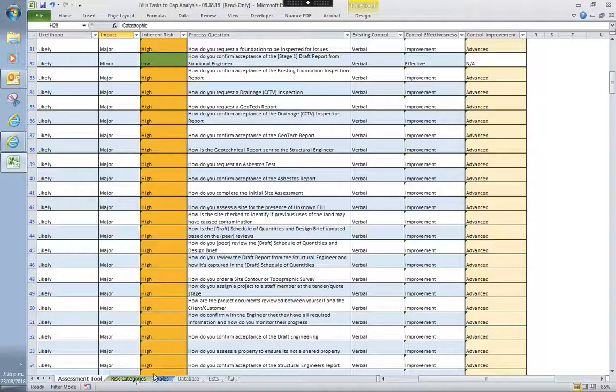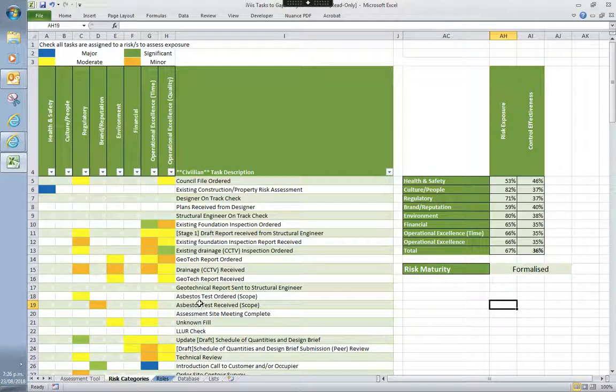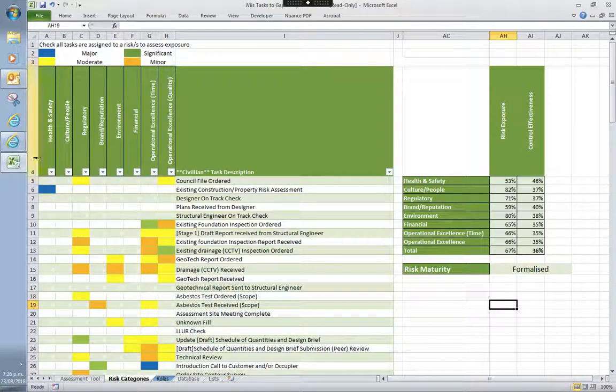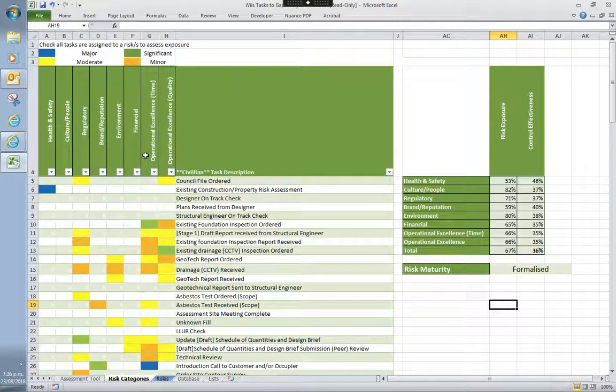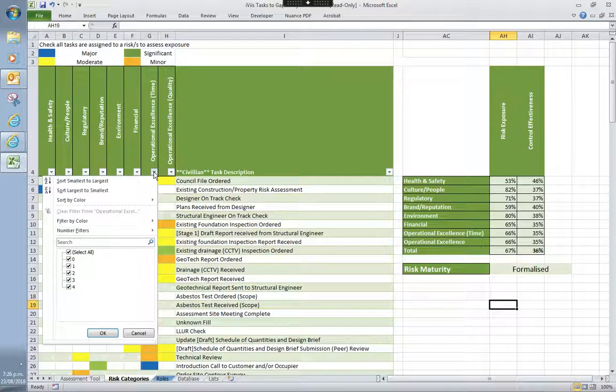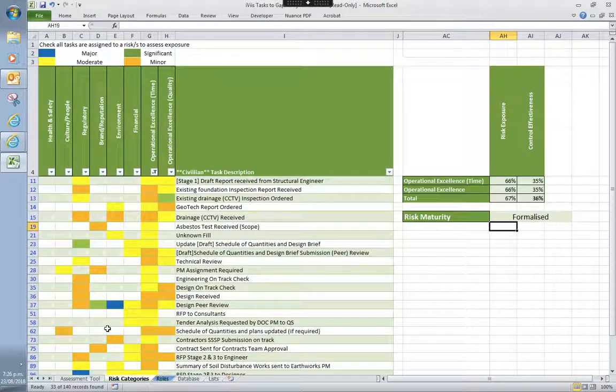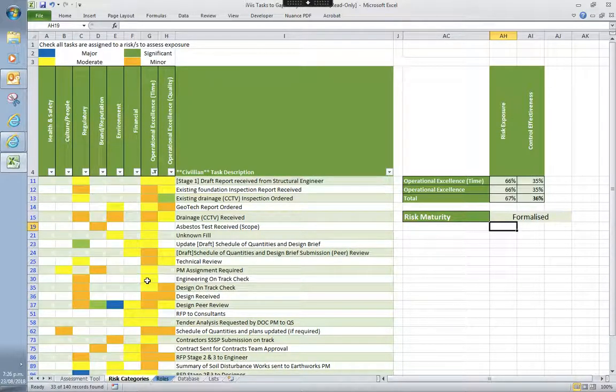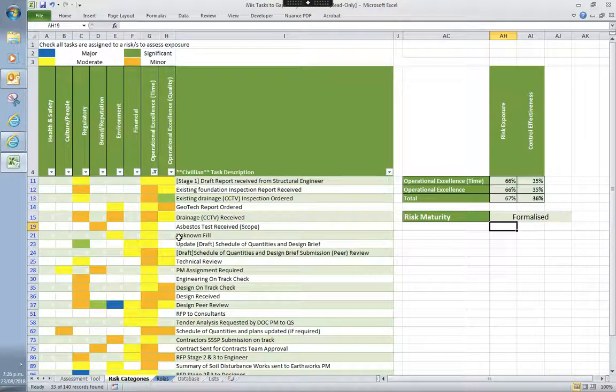All right. Next up, because everything is connected, we have the risk categories. So what we've looked at is the eight major categories, which is health and safety, culture and people, regulatory, brand and reputation, environment. You can read the rest from there. You can drill down to it so you can look at it from a risk appetite point of view. So if you have a time critical project, you can go through and select, let's go to the most critical. So this tells you all the tasks that are time critical for that project. So if you don't have the right systems in place to manage those time critical tasks, you're probably going to have a problem.